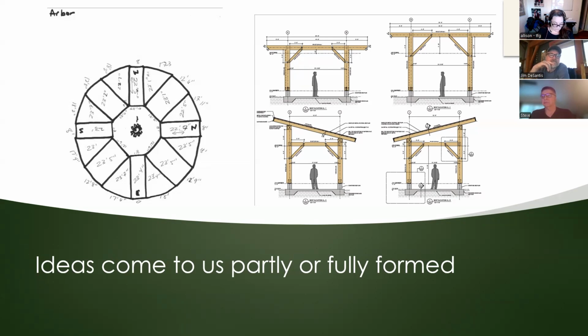Most of us can probably imagine a timber frame that would support that kind of roof, and develop that very basic concept into an outline of a timber frame. That could be enough for me to provide a letter with a budget cost estimate, maybe a range of pricing, saying it's a very basic concept, so we can't give a firm price, but we can tell you roughly what it's going to cost. So ideas don't need to be well developed to be able to move forwards.